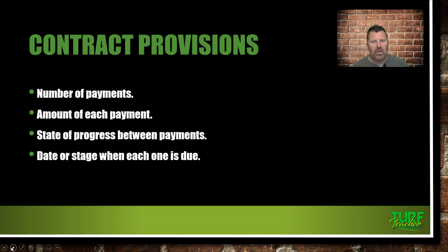They're giving you a down payment to get started, and then in 2 weeks, you're going to get another third of the total sum, because they give you a third down. Then you get 2 weeks, another third, and then when you complete it, there is another third given to you. And it may state what paperwork you need to submit, how you're going to get paid.